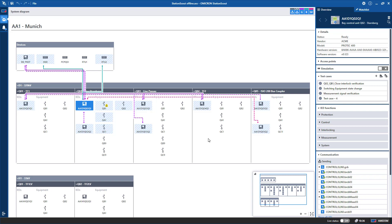The modified ACC file can further be distributed to the commissioning team, who can use it on-site. If changes are required during commissioning, they can be incorporated and saved as a new ACC file shared with the operations team for site acceptance testing and post-commissioning activities — like firmware updates when vulnerabilities are identified in different IEDs, or for extension bay projects in the same or typical substations. StationsCode can be used throughout the entire system lifecycle of your substation automation system projects.